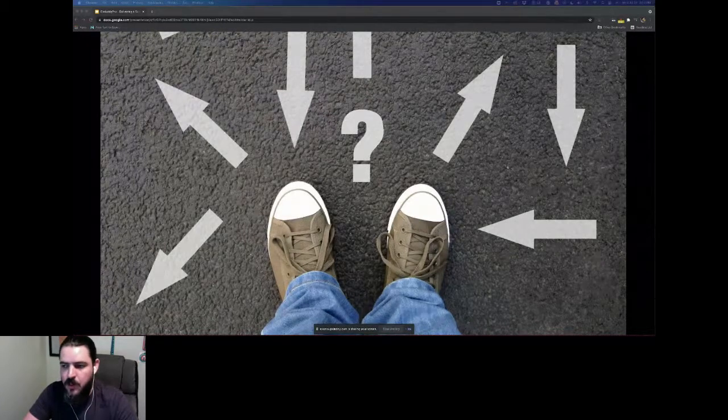And we'll quote the work in sprints. And the client themselves has the ability to say yes or no on what we're working on based on the order of priority we set at the beginning of that project. And as we evolve and as clients ask for things, or as we discover unknowns, the project might change and shift.